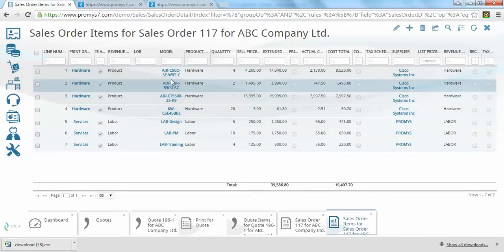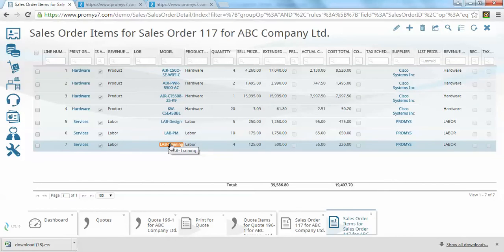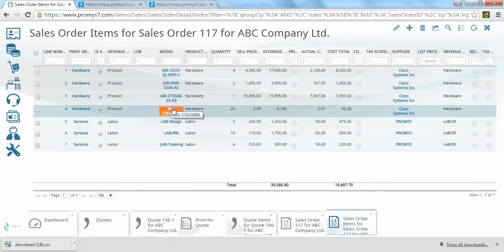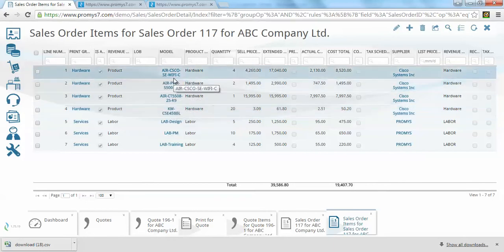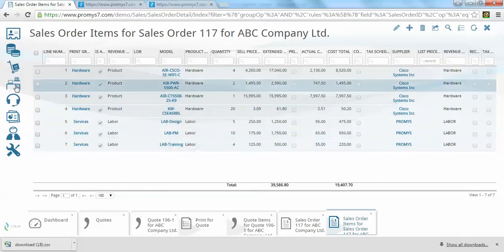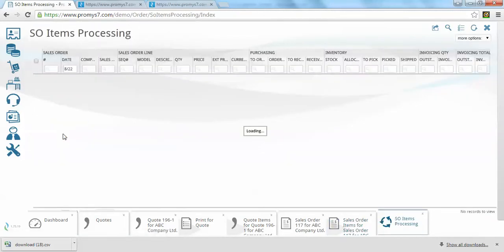Now, there's two different streams. I have my equipment fulfillment stream and I have my service delivery stream. Most project managers, most service delivery people are going to have to wait for either the equipment to be brought in and staged or drop shipped to the customer in order to coordinate and start to schedule service delivery. And so we also help the project managers with that by providing them with real-time visibility into the delivery life cycle of the bill of materials without having to go and bug the purchasing admin team.